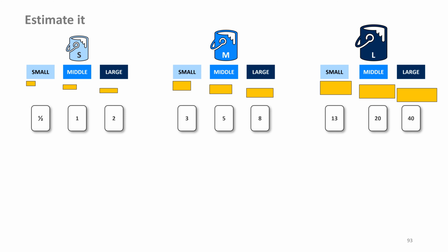The challenge now is to calculate the velocity of the team from the numbers. This can be used to determine how many story points can be completed on average by the team per sprint.